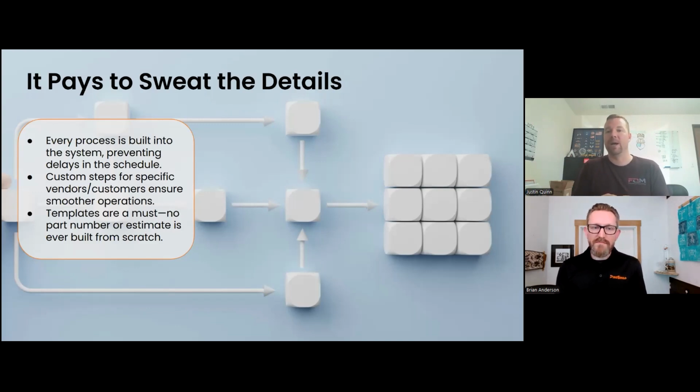We're on our final inspection stage, and my quality guy was like, "Hey, I don't see an ultrasonic inspection cert anywhere here." And so, we're at the 11th hour, a day or two before shipping, and now we realize we have this problem. And thankfully, our customer was able to work with us and said, "Hey, we can accept these parts if you get them ultrasonic inspected in their completed state now." And so we were able to implement that workaround.